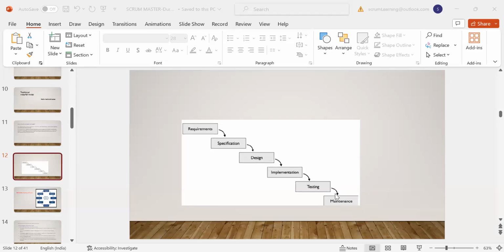So this is one of the drawbacks in the waterfall method, because we have a lot of dependency. The development team, the testing team, or any CI/CD pipeline team have to wait until their turn comes up. That is nothing but a waste of resources. It also used to take a lot of time to deliver the project. If we gave it today and asked them to deliver tomorrow, or at least within 1 to 2 weeks, it was not going to happen. It used to take almost 3 to 4 months. Seeing all these possibilities, they felt this was not the correct way to deliver a project, and they found a better way of delivering.